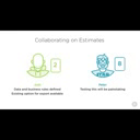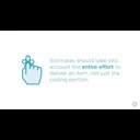Is that correct? At this point, Alan jumps into the conversation and says, Peter, thank you for bringing that up. Since you'll be operating as a cohesive team, remember you're all developers now, your complexity estimate should include the entire time required to design, code, and test a feature or to do anything else that you need to do to be confident as a team that it's complete.